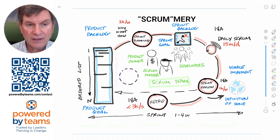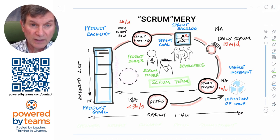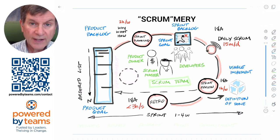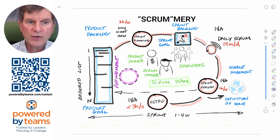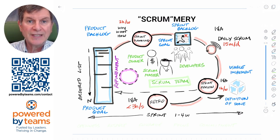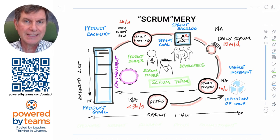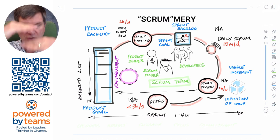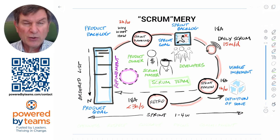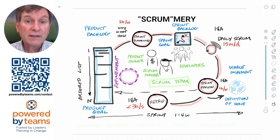We've taken a look at the three accountabilities in green, the five events in red, and the three artifacts in blue along with their commitments. There's one other activity that goes on in Scrum — product backlog refinement — which is an ongoing activity to get things ready for upcoming sprint plannings. It's not sequential; it goes on concurrently with the sprints. Things you might do in refinement include reordering items in the product backlog, clarifying things, splitting things — really anything you need to do to get ready for upcoming sprint planning.